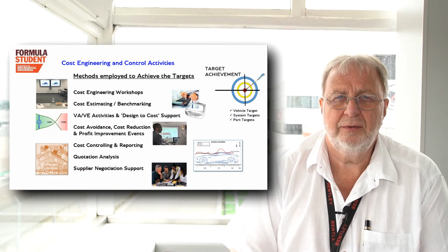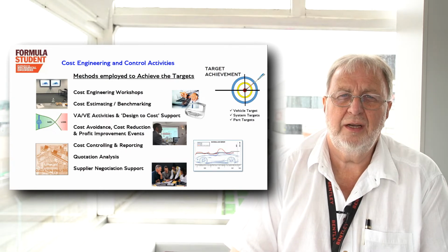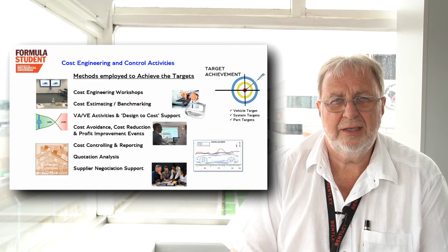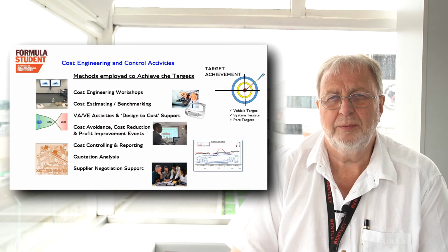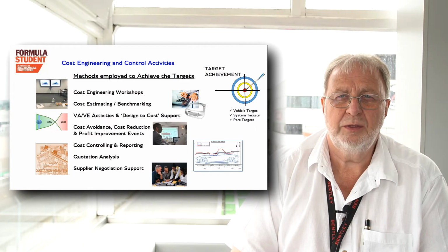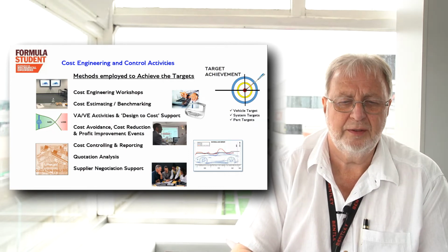Certainly go out for several quotes against the same item if you can, but do your own target setting for some of the key stuff that you're looking to outsource, just to have a good feel as to what you think would be a fair and reasonable price, so that you can challenge that and bounce it back with confidence to your suppliers to try and achieve a cost reduction to the price that they've quoted.